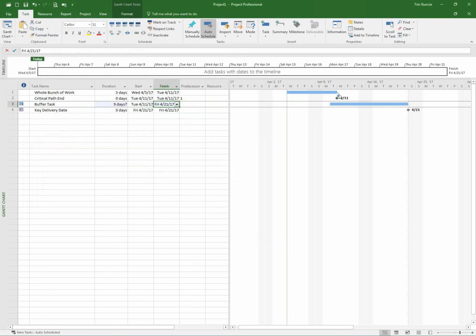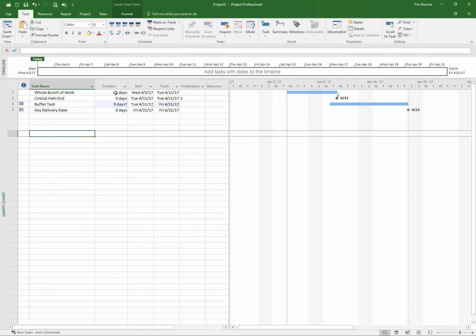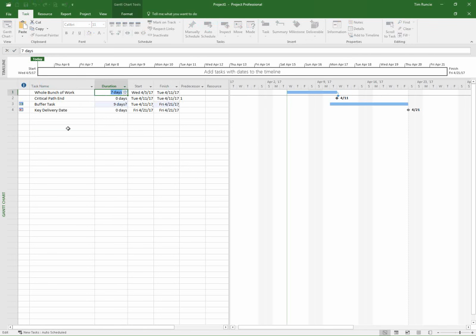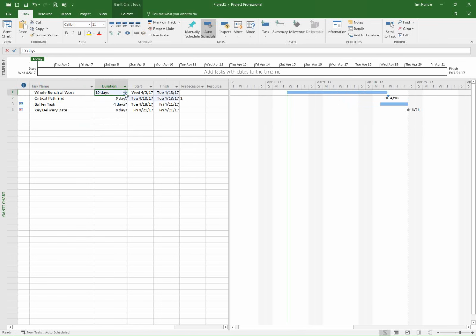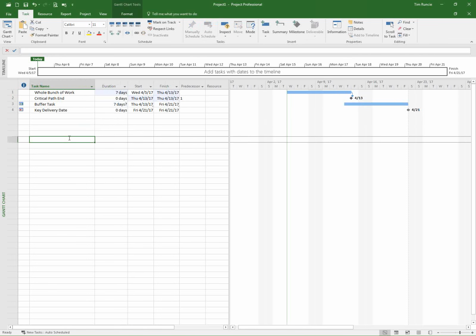The idea is that the end date of our critical path tells me when my buffer begins. Then I have a hard stop, or an end period, that I want to link to there. But in Project, of course, you can only link to a start or a finish. In this case, we've done a paste special, paste link. The overall idea is that if your project takes longer, we can actually watch that buffer disappear. We can make it shrink, and we can make it expand.